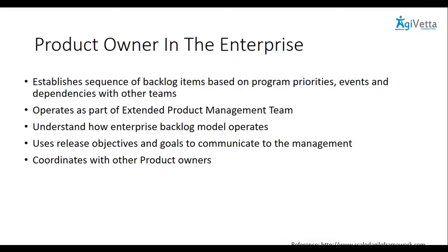One question that is coming to my mind and might come to your mind as well: how many product teams, so how many agile teams, can one product owner work with? One, two? Okay, there is no specific answer to that, but definitely not four or five, that becomes messy. Again, the same thing: product is scaling up. That was the question we started with. If there are more teams, you will need more product owners. If there's one single product, very large and complex, you have more product owners. So one to two, max four teams. I think three teams. I don't know.